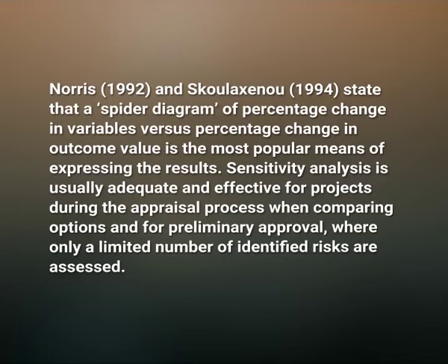This quickly illustrates the most sensitive or critical variable. Norris in 1992 and Skolexon in 1994 state that spider diagram of percentage change in variable versus percentage change in outcome value is the most popular means of expressing the results.